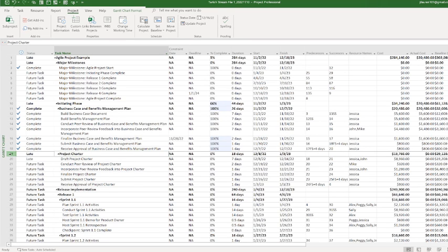And then they're worthless. So you cannot touch your bold lines. This also means your summary lines should never have any form of resource association. They should never have any predecessors or successors associated either, because again, when you have everything auto scheduled, things will shift and move.